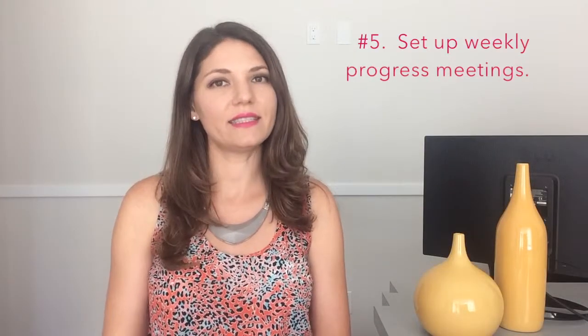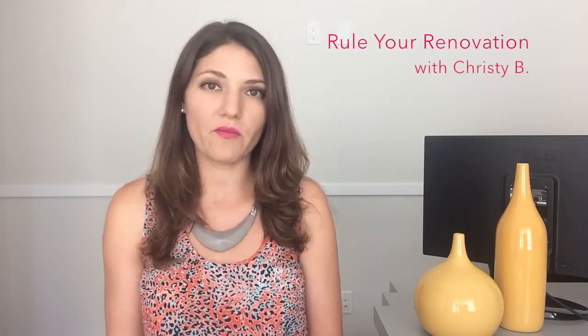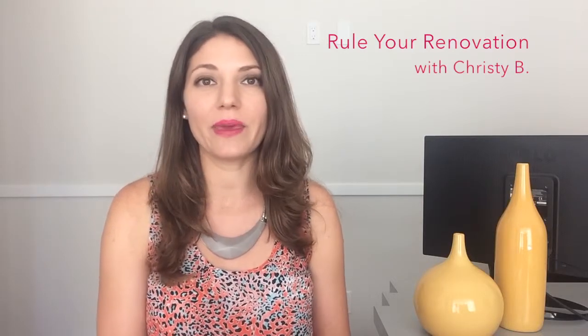Number 5, set up weekly progress meetings. I'm a big believer in the weekly check-in because, after all, how can you know if you're on track if you don't know where you stand? Your progress meetings are going to look different depending on what type of project you're doing. So if you're working on a new home build, maybe you're meeting less frequently in the beginning. Or if you're towards the end of a room makeover, then maybe you're meeting every day of the last week to make sure that finishing touches are getting done properly.